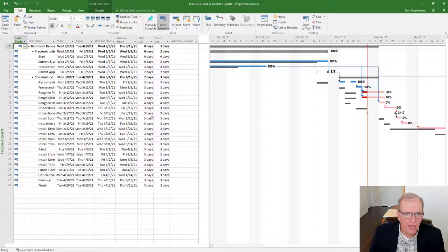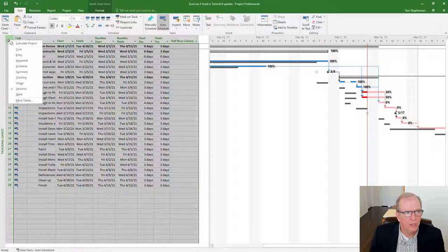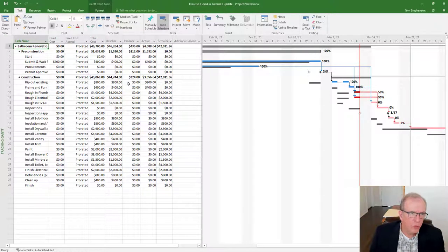Now this is by time. We know we're 3 days behind. I wonder how much over budget we are. Let's go to the cost screen. If you're cost loading your schedule, you'll also see if you're over on any of your variable costs. I didn't change any of my actual direct costs, like my contracted costs, but I do have a variance, and that's got to do with my project taking longer.